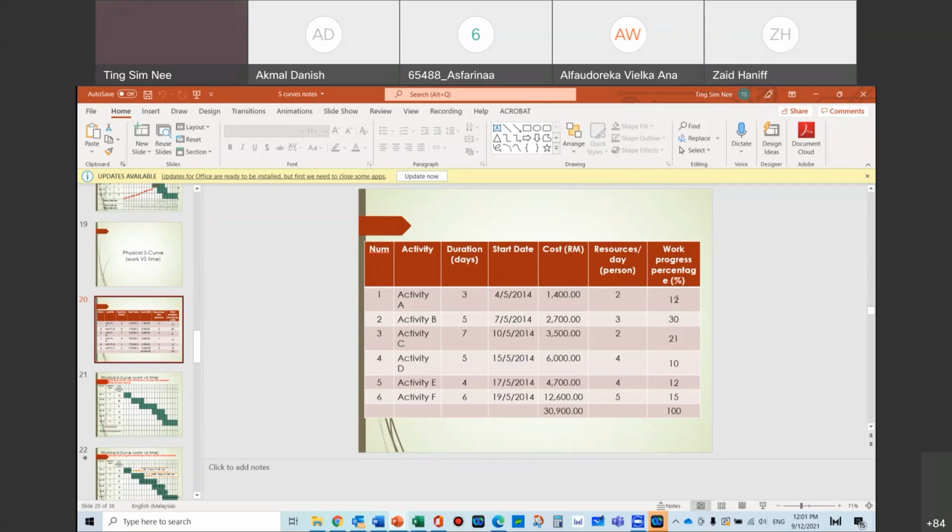So what happens here is you will take activity A is how much percent of the overall. Some people base it on money, but I don't think so. It shouldn't be the case. So you can allocate a percentage. This work will take how many percent of the overall work. This is an example for 2020. Altogether you have 100%.